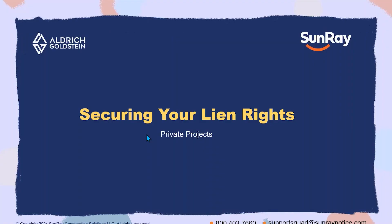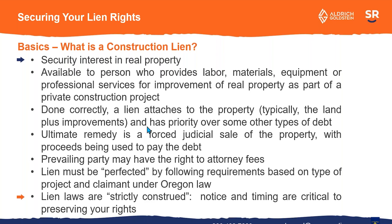Let's go over some basics for securing your lien rights. What is a construction lien? It's a security interest in real property. If you're a contractor that provides labor, materials, equipment, or professional services — like an architect or designer — you may have lien rights as long as it's a private construction project. Ultimately, the remedy could be a forced judicial sale of the property. The courts take these pretty seriously — they want to make sure that all your teeth are crossed and your eyes are dotted before you potentially have that remedy.